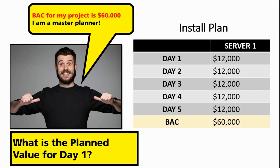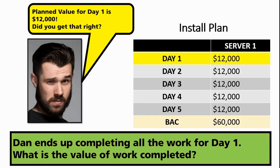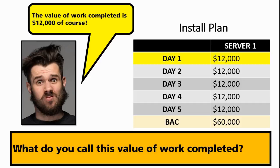The planned value for day one is $12,000. It means that the budgeted cost of the work scheduled for day one is $12,000 — he budgeted $12,000 for day one. And as you take a look at his install plan, you can also see that for day two, three, four, and five, the planned value is $12,000 as well. So planned value is the budgeted cost of work scheduled across a particular time period. In this example, it is a one-day time period: $12,000. Dan ends up completing all the work for day one. If he got all the work that he had planned for accomplished, what is the value of work completed? The value of work completed is the price tag you put on it: $12,000.